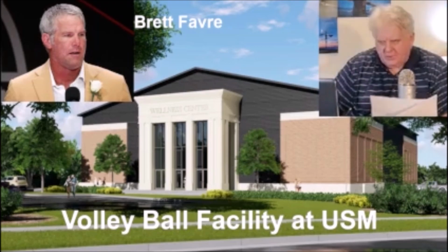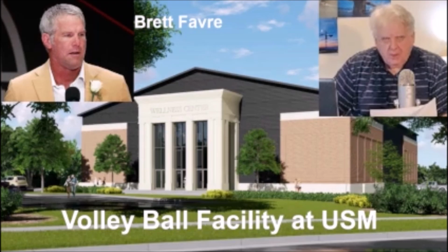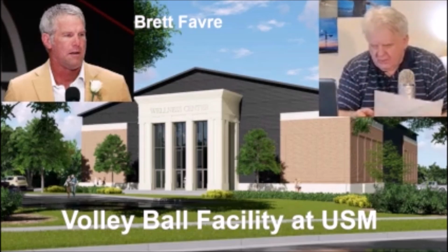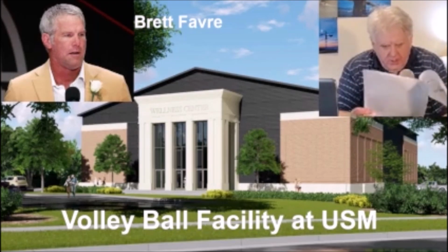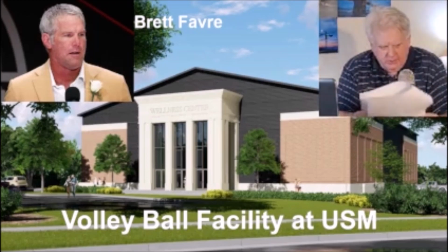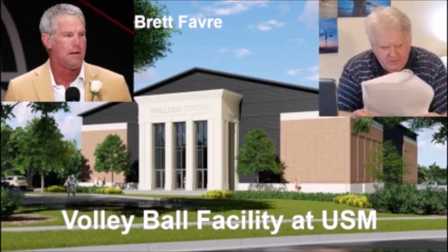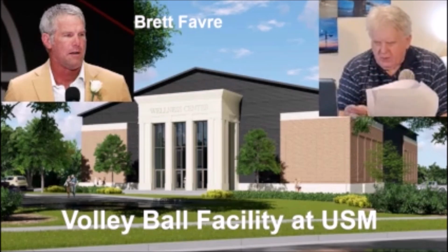And the reason why I say that, Brett was involved, he was like the de facto project manager, he and his wife, in getting the facility built and raising the money. And his initial estimate on this project, he had thought was around $4 million. And when the bids came in, he says in a statement here, the bids are in, and shockingly, the lowest is $6.9 million. And the architects were confident it would come in lower than what we have saved. And he says it's really frustrating.